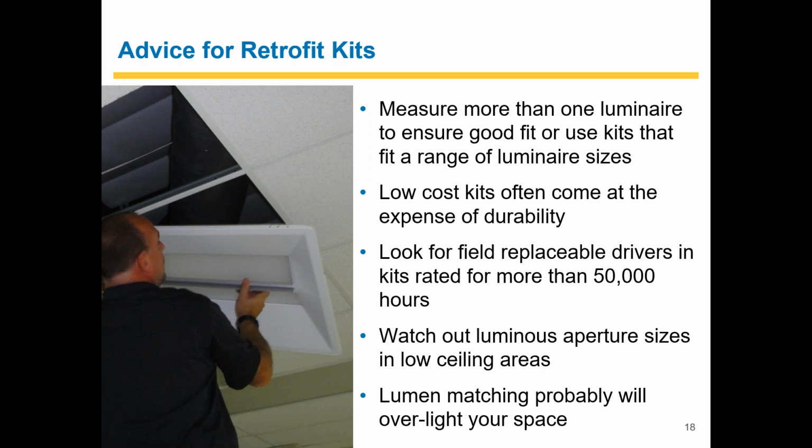So you want to make sure you're thinking about a driver replacement if you're expecting the lighting system to last more than 50,000 hours. Same thing, especially with field replaceable, is if you're doing any luminaires that are going to be installed behind drywall. We did a design review for an airport where they did a nice lighting system. They used 4-inch channel lights that were installed behind drywall. And we looked at the spec sheet during the design period, and we're like, guys, these cannot be maintained from the field. You have to access the driver from behind the drywall in order to replace it.